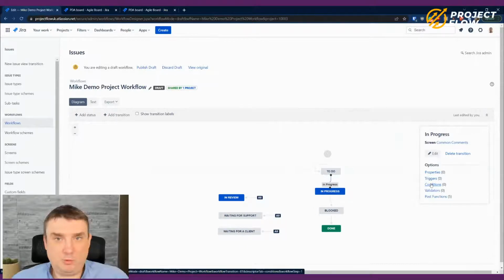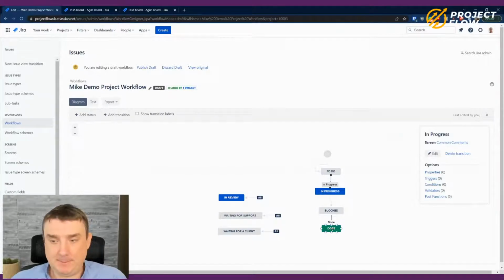I use this sometimes in a production environment when we move tickets from any status into done, because when you're completing a ticket in some serious projects, it's a serious operation, and very often, like in my case, as you can see over here, it will be impossible to reopen the ticket, which, by the way, is how it is designed. But you can, of course, create a condition, like I said, based on a group or a role.